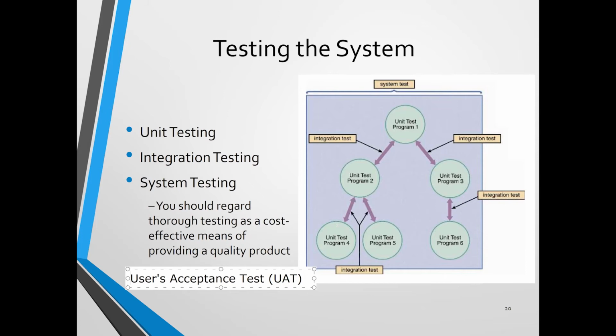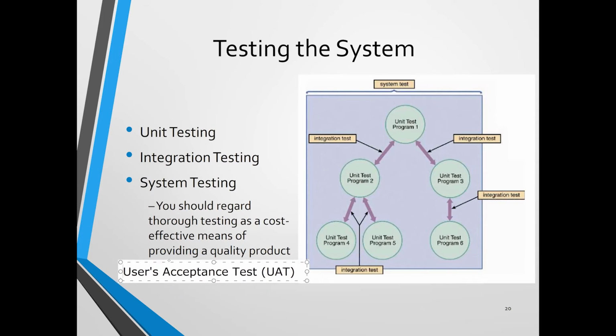They don't test each unit. They don't test for the system, but they test for the whole thing, for the whole information system for you. That means you have to pass system testing already. So when it's passed, then you just send this kind of system for the user acceptance test.